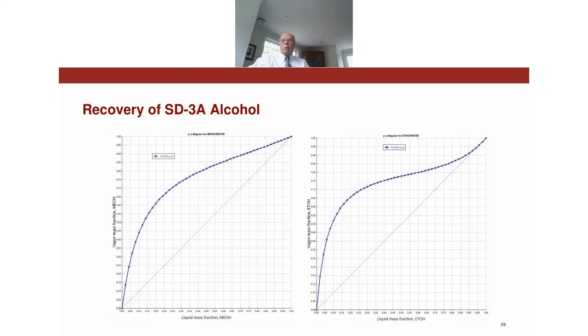So we designed and built a system. It took us about a month and a half to do the process design package, and then about another 10 months to do the detailed engineering and delivery of the system. And that system's been in operation for approximately 10 years now and working just great.